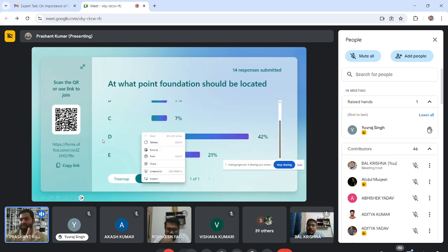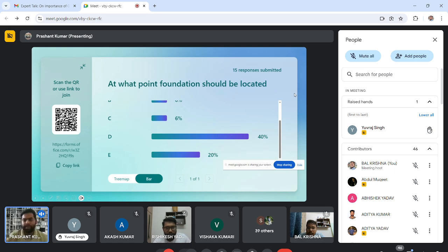So now I'll just show you guys. Before we go to the construction site, what does the department do before the tendering process? Here, a DPR consultant does some study, which is also called feasibility studies. On the basis of that the tender is done and we quote our prices and then we go on to construction. So I'll show you the tender drawing which we got for this bridge.